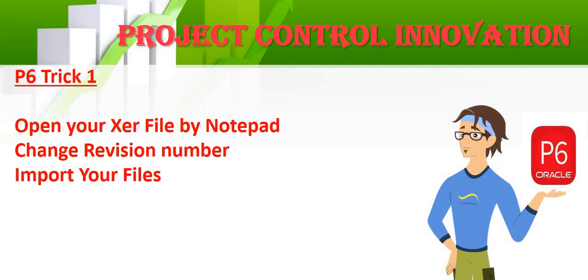So there's a trick here how you do that. You go to your XER file and right click and open by Notepad, and then you go to the revision numbers and you change the numbers. After that you save it and close it, and after that you will be able to import your file.